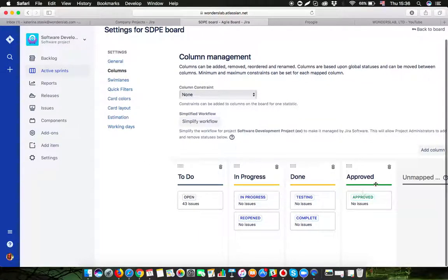I recommend having 4 columns in the process, and the 2 middle columns are going to have 2 statuses. Why is that done? For example, if you create 6 columns, and each column represents a separate status, that's going to be overcrowded. It's not going to be convenient for you to read subtask names. Everything is going to be cut down because most of us work on laptops. Only designers work on those huge screens, and they can have 10 columns, and that's still convenient for them to view. Us simple people, we use laptops, and 4 columns is an optimal size for you to view the